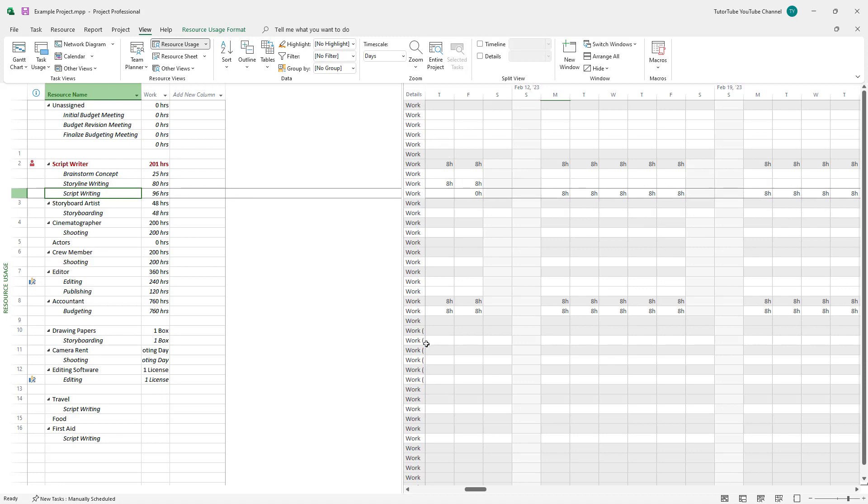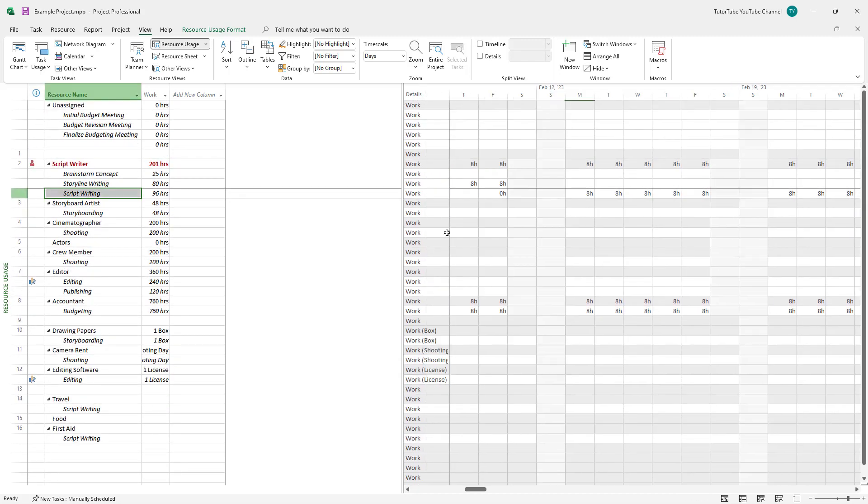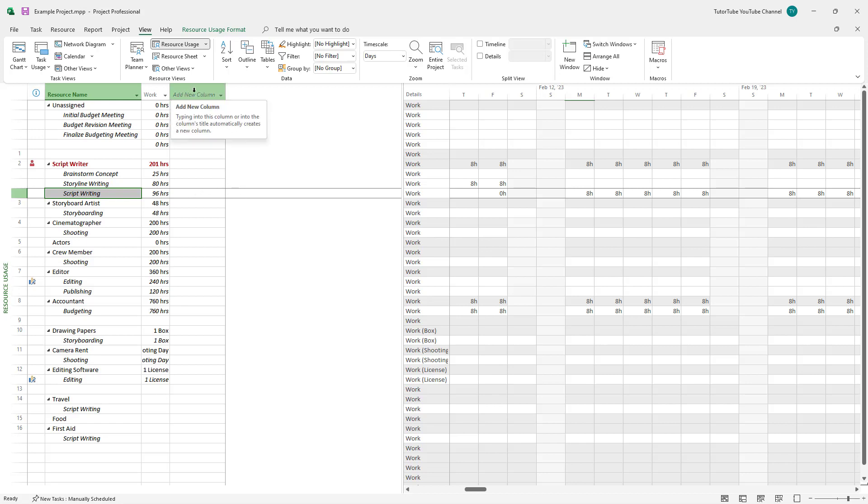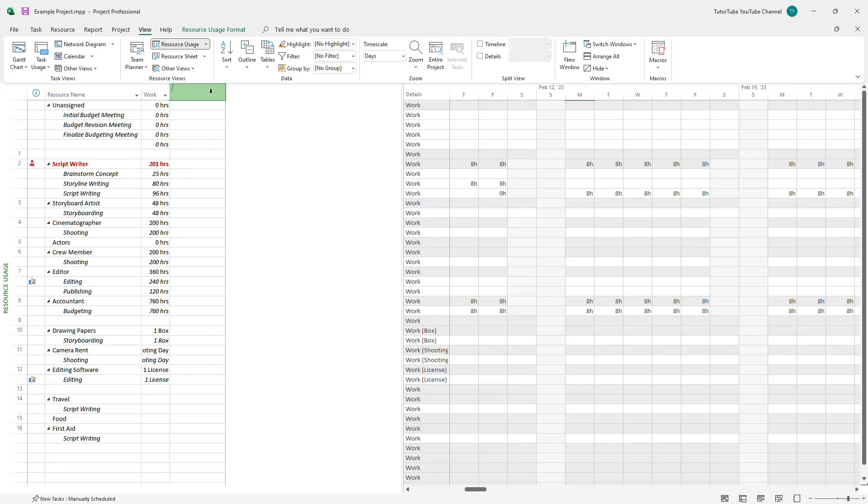Individual types of assignments and details are shown here. For the drawing papers, you can see boxes are assigned. But we don't see the overall cost. To see the overall cost, we can add a column dedicated to cost.